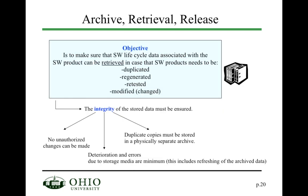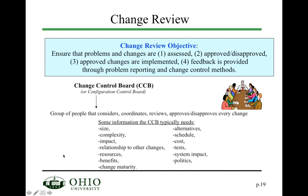Archival, retrieval, and release is one of the basic configuration management activities. You need to make sure the software product can be retrieved in case it needs to be duplicated, regenerated, retested, or modified. You want to be able to archive the software but also retrieve it, and when done, release it. You also want to guarantee the integrity of the stored data, ensuring no unauthorized changes occur and that all changes go through the standard change review process.